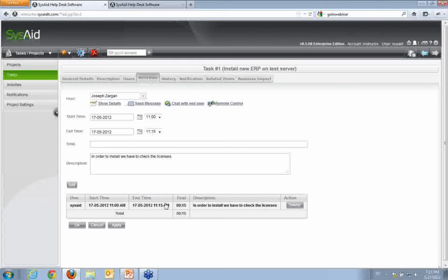Maybe you need permissions to access the laboratory, and that takes time from the security department, and so on and so forth. So the first thing to do in the first project that you implement is detail every operation that you will perform and gather the real time that it takes.